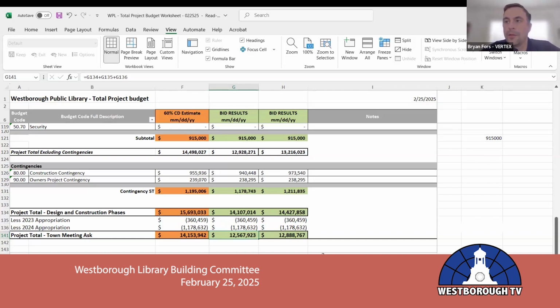As we get closer to the end, you'll have an understanding of what leftover funds would be available to either turn back over to the town, or if there were any things that were cut out of the project earlier, that now could be put in, that would be the time to talk about it. We would track those remaining funds and ultimately forecast what the savings would be at the end of the day. But yes, all contingencies are not the contractor's money. That's the town's money.